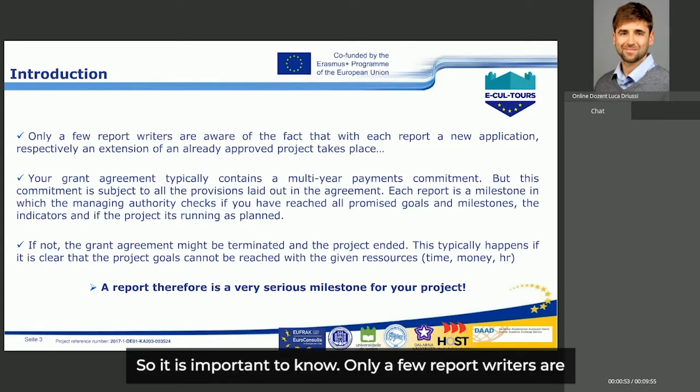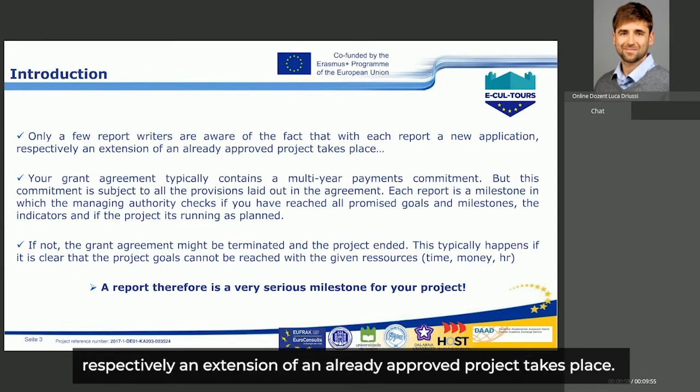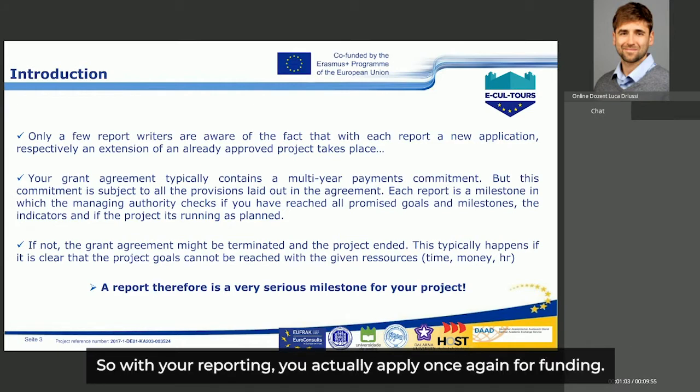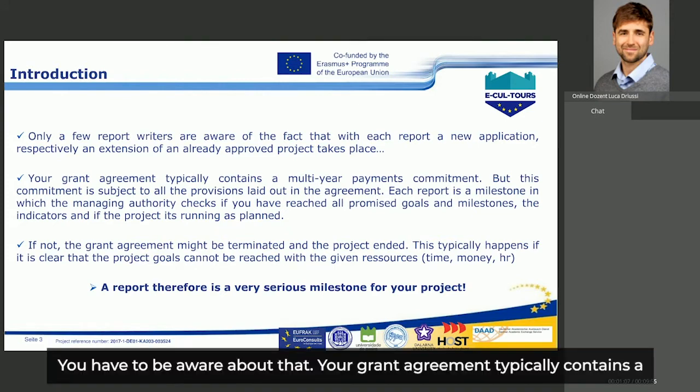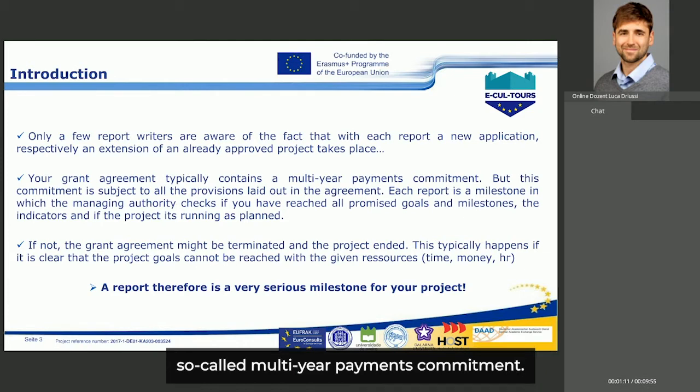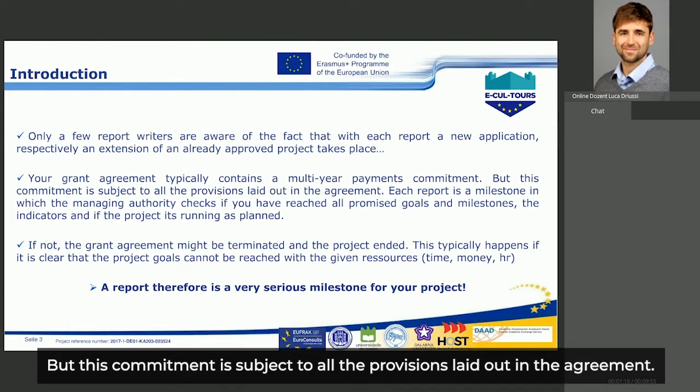So it is important to know, only a few report writers are aware of the fact that with each report a new application, respectively an extension of an already approved project, takes place. So with your reporting you actually apply once again for funding. You have to be aware of that. Your grant agreement typically contains a so-called multi-year payments commitment. So you receive payments for several years, but this commitment is subject to all the provisions laid out in the